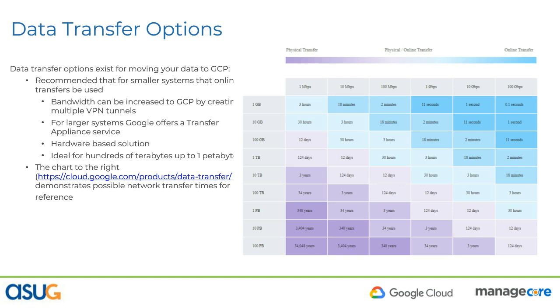As an example, if you're already on a Windows VM platform or a Linux VM platform and you want to migrate, you can use tool sets that migrate it, and you have the luxury of possibly using a tool that seeds it. Then it's okay that it takes 2 weeks to migrate data because it's all online, done in the background, and you're really just making a 30-minute flip of a switch when it's time, because it's collecting deltas as an example. Those are the type of scenarios that allow you to migrate a lot faster into GCP.